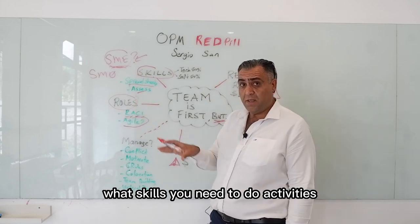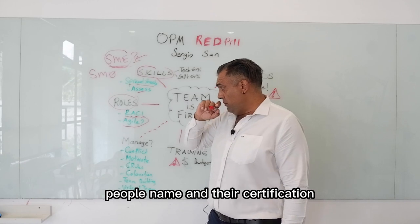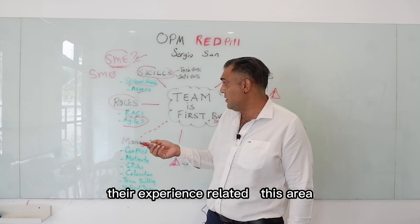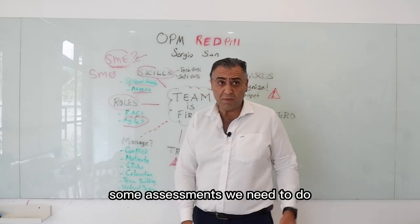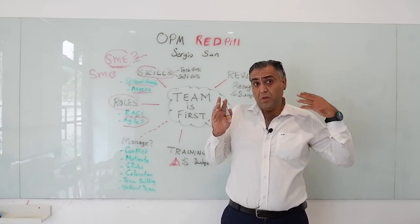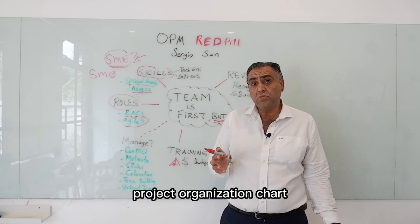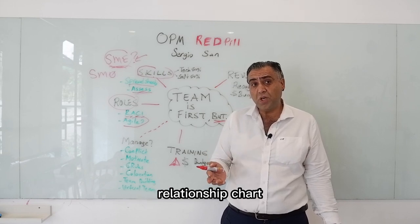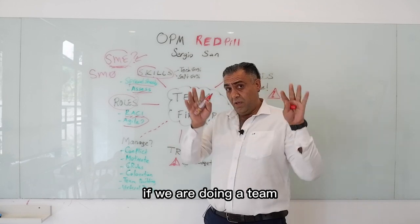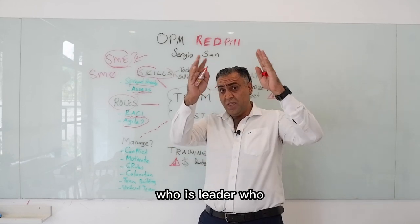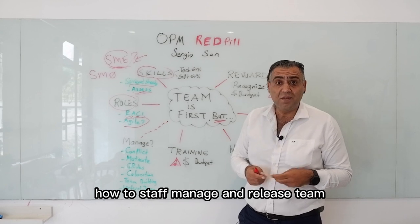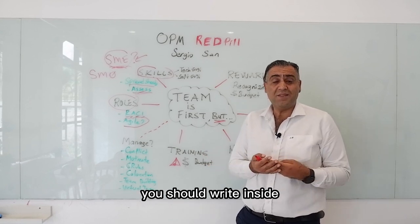List what skills you need to do the activities. Include people's names, their certifications, and their experience related to each area. Assess them — some assessments need to be done. Also create a project organization chart showing reporting relationships: who is leader, who are workers and executors. Document how to staff, manage, and release the team inside the resource management plan.